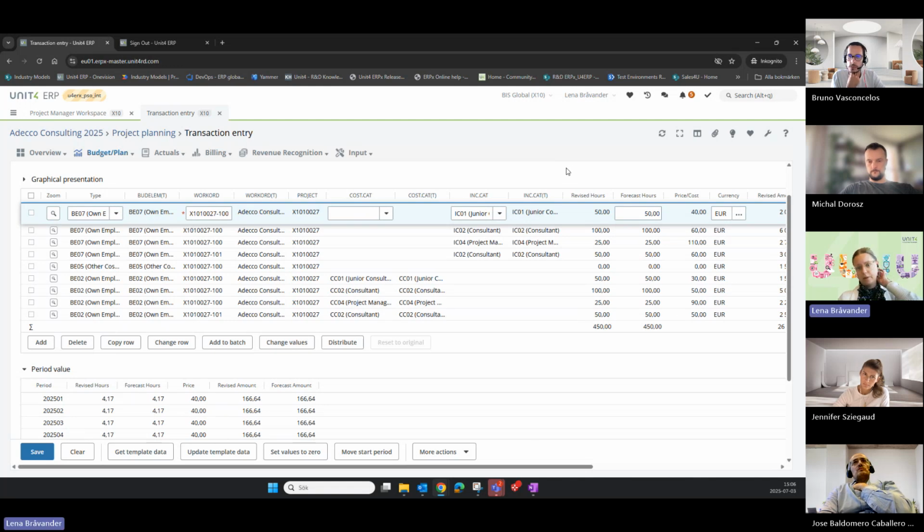And in this case, we're entering all amounts and everything in positive amounts. I think in Euphoria you had both positive and negative, but at least that's our experience, that project managers don't always realize they need to do the revenues in negative numbers. So we just add everything here, and then the reporting will take care of that.